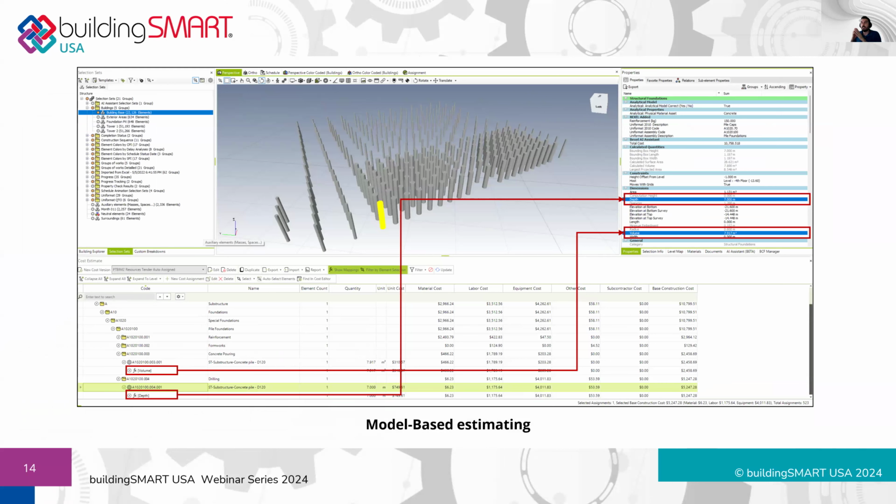So yes, the system needs to be robust. It needs to be applicable no matter if your model is LOD 200, 300, 350. You should be able to calculate with a reasonable precision your quantities to the model, even if its level of development is lower or is not on the highest level. Why is this important? Because creating and developing a very detailed model requires engineering hours. Engineering hours are costly. So I mean, this is the business.